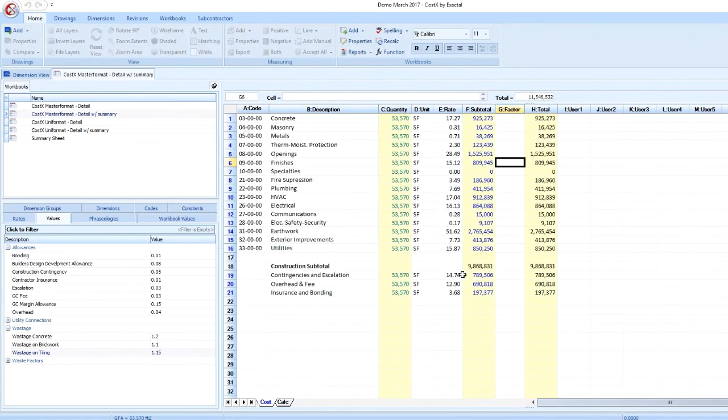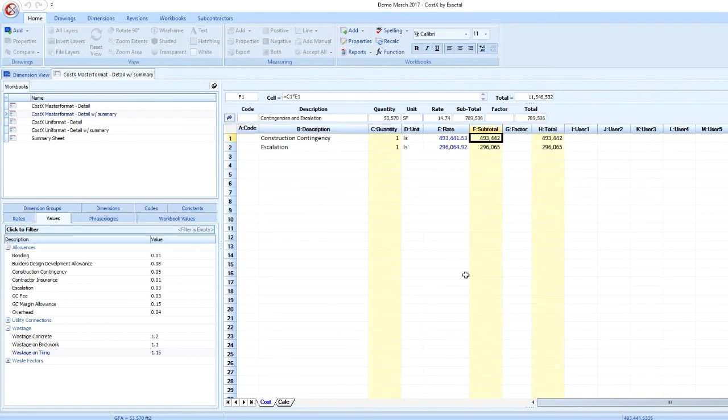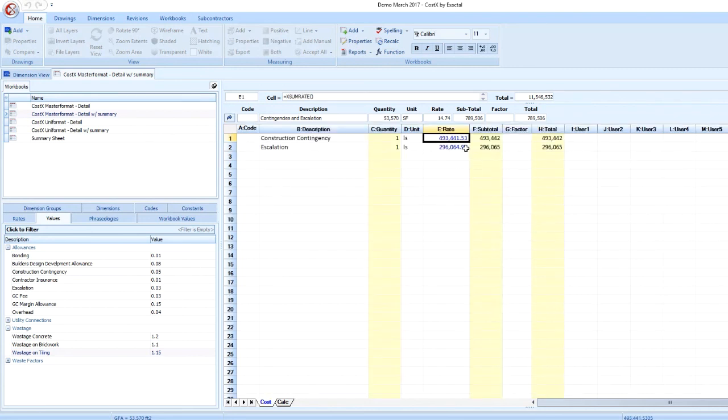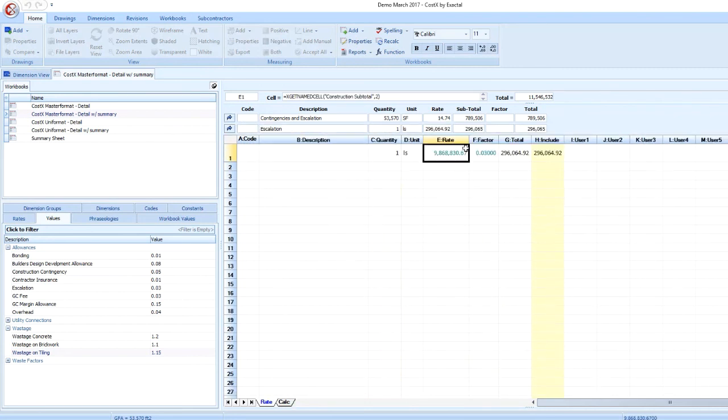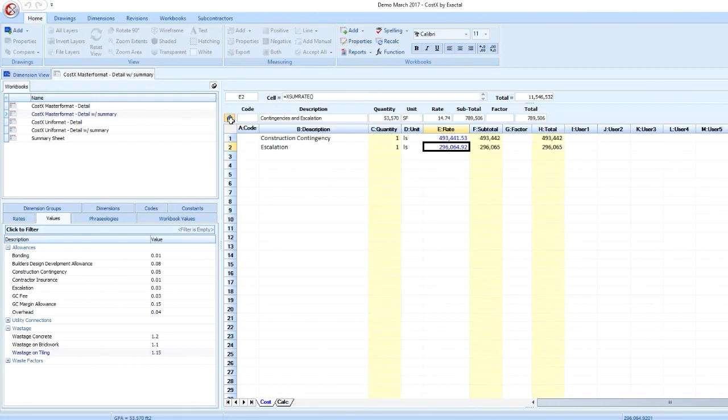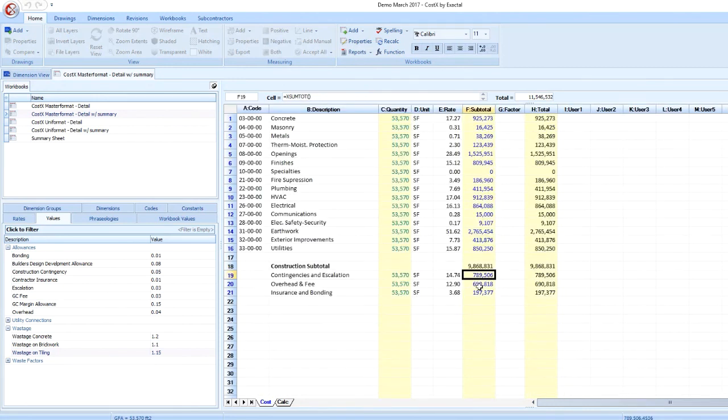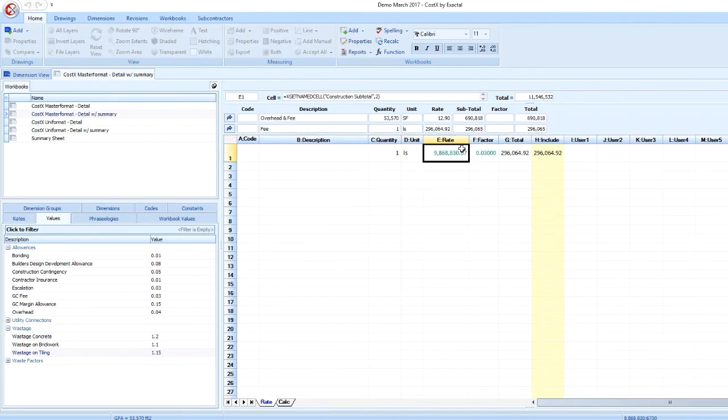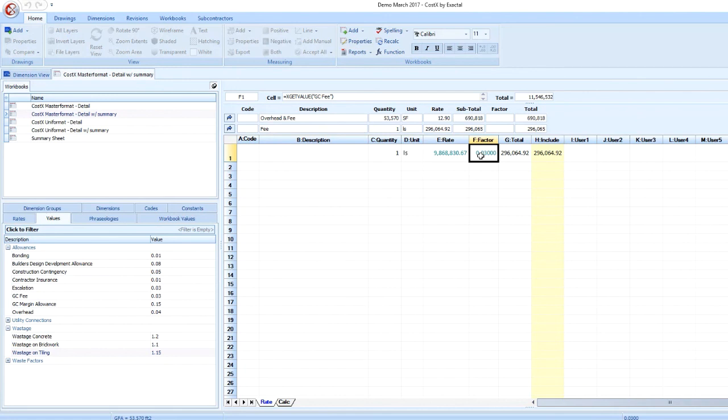I have already live-linked all of my general conditions percentage costs from my global standard set of values. However, these global standard values can be overridden individually on a project-to-project basis. This can be done by going into Project Properties and adding a value with the same name. You'll notice that right now I have my global standard value for GC fee set at 3%. However, if I decide to adjust that fee up to 4% for this project specifically due to its complexity, I can always override the standard fee by assigning a project value with the same name.